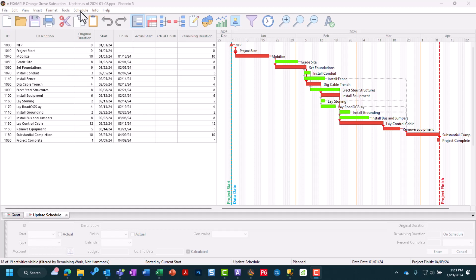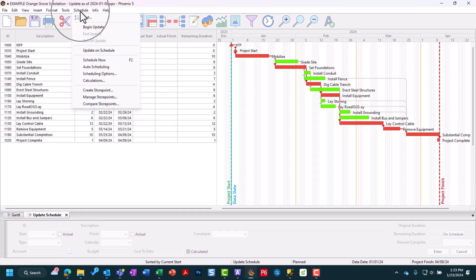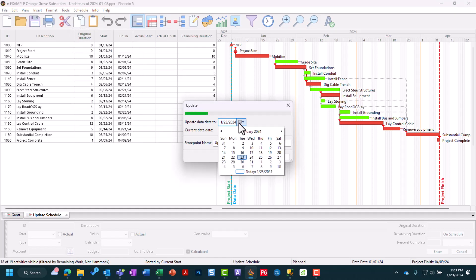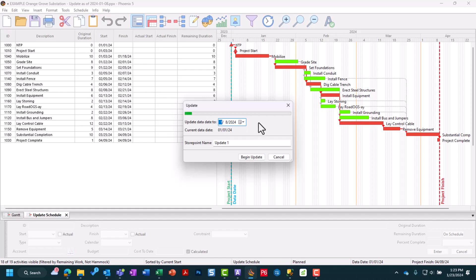Now with all that set up, we're ready to roll. We can head up into our Schedule menu dropdown and choose to Begin an Update. Here it's going to ask us what our data date is. For us, we can point it to today, January 8th, 2024. Now we just need to give it a name.